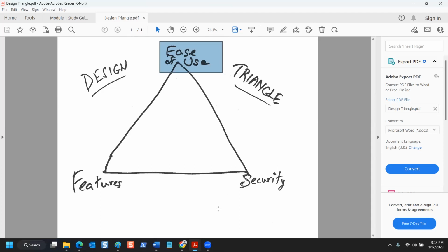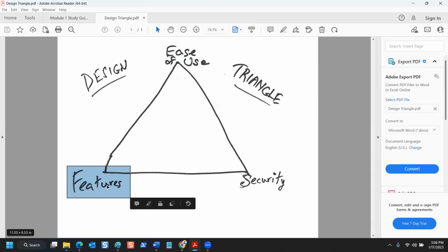You started out developing an integrated solution, and everybody agreed to a certain baseline of features. And then as the project evolved, the users said, oh, but that's not how we want this. We really have to add these extra things in there. So the size of the project and the number of features you have to build into it keep growing and growing and growing.